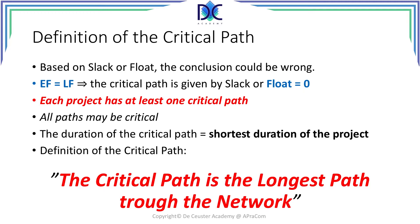On the other hand, imagine that instead of having time till April 15th, we only have time till April 12th. When we calculate back from April 12th, we will have some activities with float equal to zero, but we will also have activities with a negative float. Again, defining the critical path as the sequence of activities where the float is zero would lead us to conclude that we have a critical path, but we would select the wrong critical path.